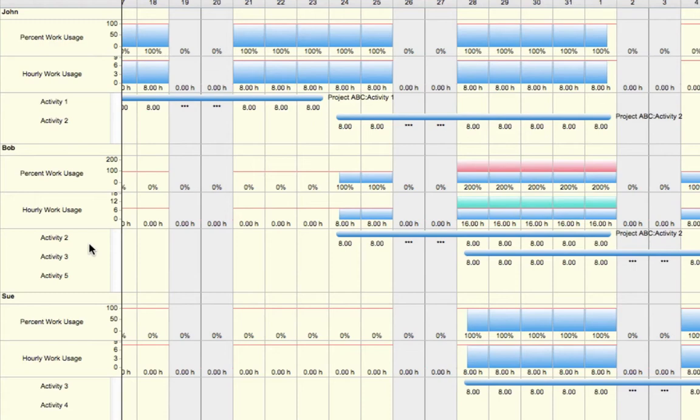As we view Bob's graphs, we'll see some areas that have both red and green shading. What this indicates is that Bob has tasks that he's currently over-assigned. What this means is that Bob is working double the amount of work that he's currently allowed to within a given day.